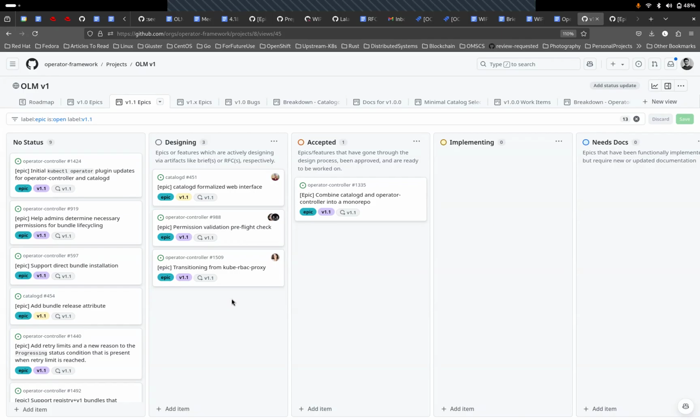So how do we define these milestones? By priority, so the topmost priority things go to 1.1, and things which can wait go to 1.2. Because we'll do 1.1 first and then 1.2, whatever is high priority and we need to do now, the most important things, should go to 1.1.